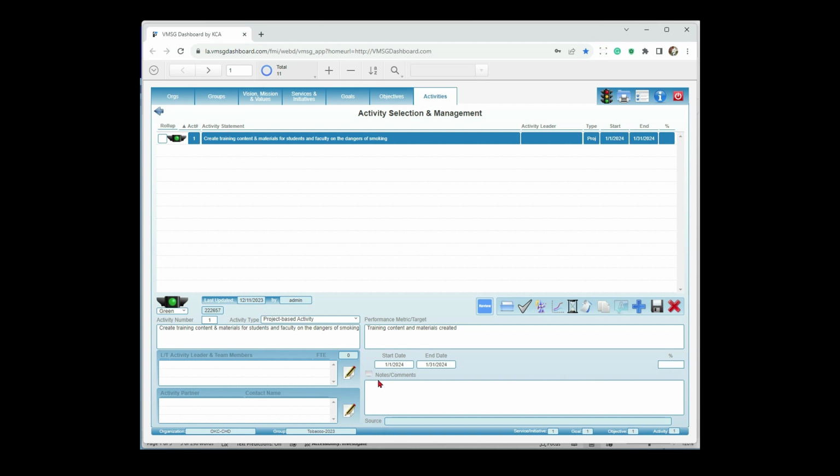Now, what I might do down here as I'm updating this information, say I'm building the training content over time. Let's put a note down here. It says completed chapter 1 of 4. That tells me that I'm about 25% done. So I'm going to put in 25 in here. Go ahead and save that.